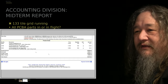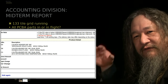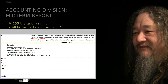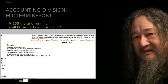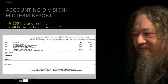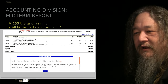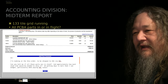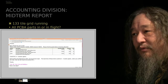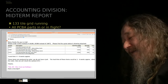I put together an order using the new part number they gave me for black intertile connectors — more what I wanted anyway — plus the 2x23 pin headers for the BeagleBone Greens, plus 2x13 headers to connect the display to the board. The only remaining question was the lead time: 7 to 28 working days. 28 working days is like six weeks. I figured with a factory they have billions of these things — they just have to scoop them out and send them. But the answer came back: these items are produced by order, they do not have stock. Three to four weeks, approximately, starting from when I confirm the order. So these parts are not in flight — I haven't pulled the trigger yet.